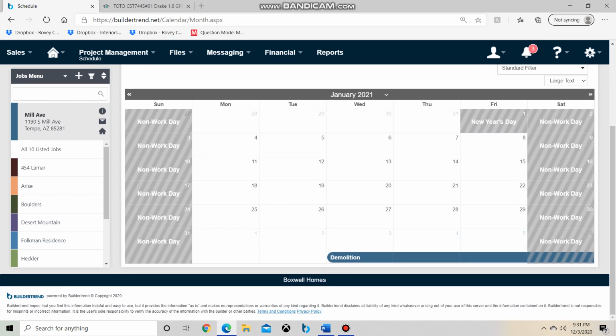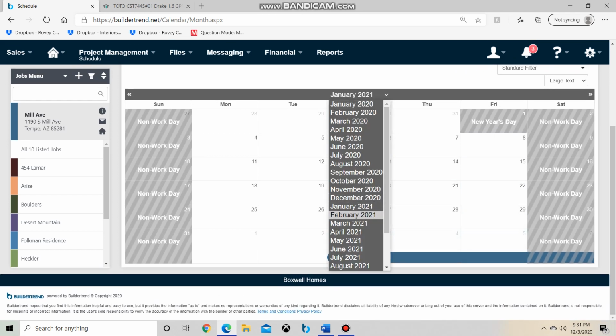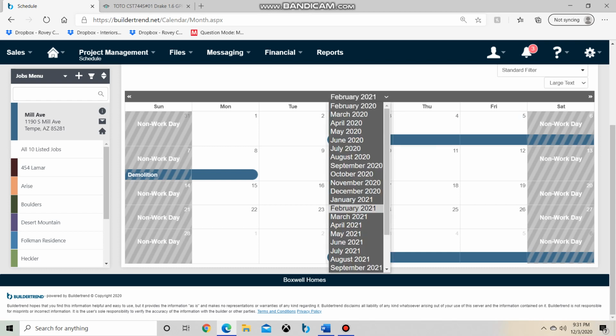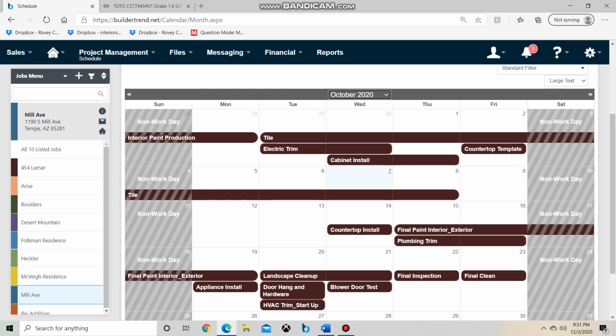So you have 3 days going to Saturday, but it comes on that Monday right there, which is an issue, I believe. They always consider Saturdays non-work days, even though a sub can work on it. It's a small issue, but let me take you to the work that I did for the project.